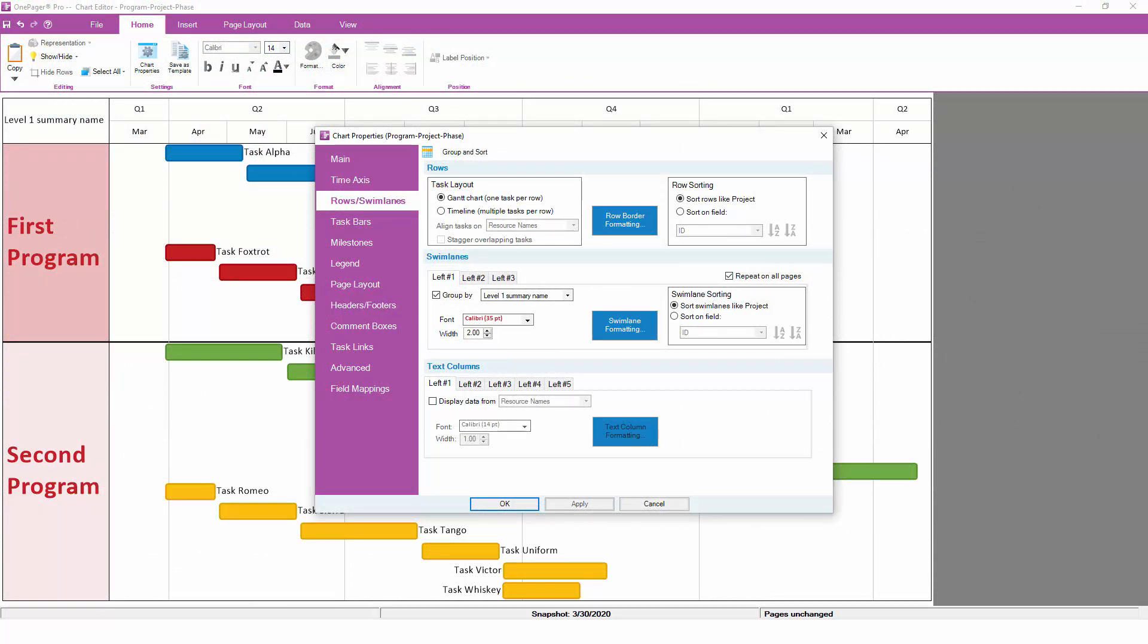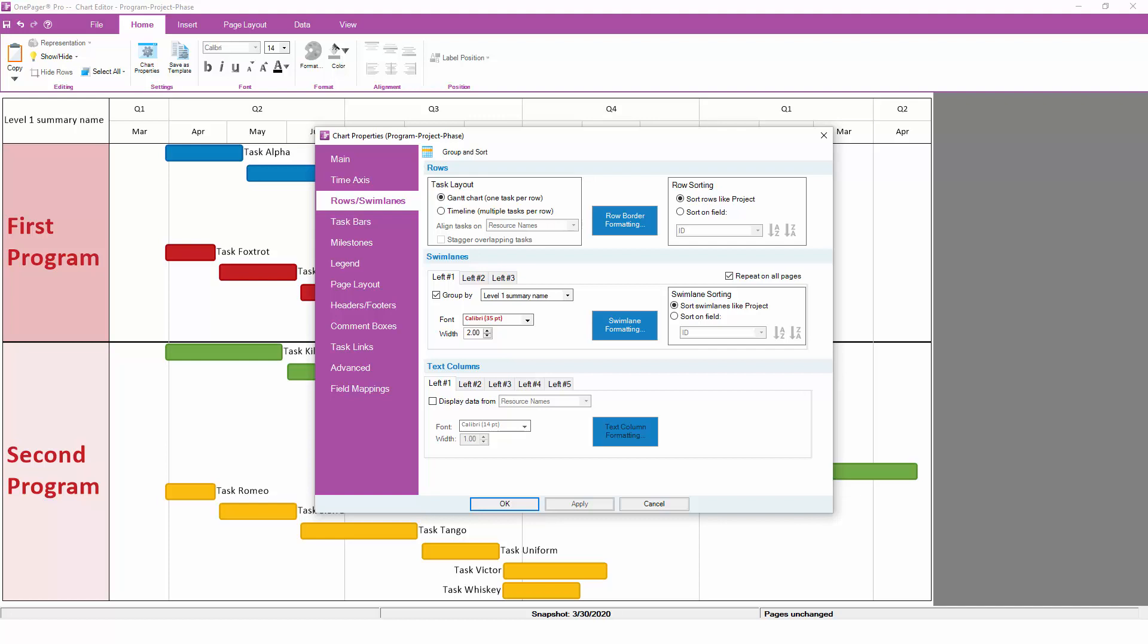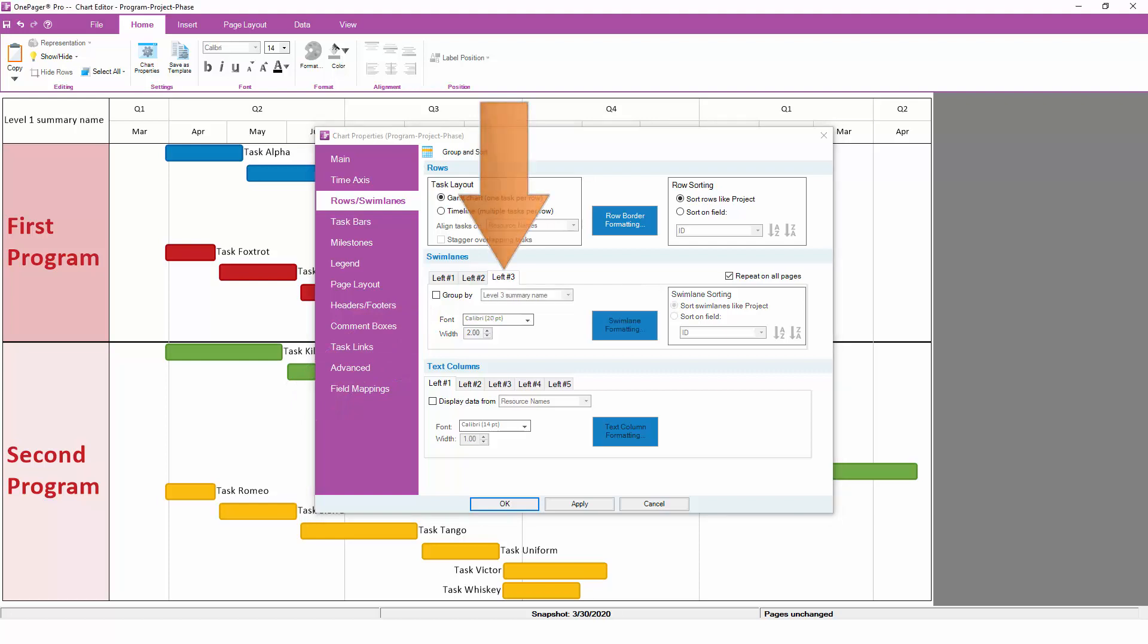On the rows and swimlanes tab, notice that there are three subtabs for each level of swimlanes. Swimlanes are ordered left to right, so your left number 1 swimlane is always going to be the biggest grouping, while left number 3 will be the smallest grouping. In this example, we have already set the first swimlane to the level 1 summary name. Now, we'll set the second swimlane to the level 2 summary name. And finally, we'll set the third swimlane to the level 3 summary name.